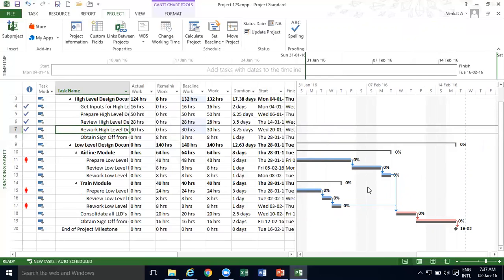Okay. Can you see that now? Yeah. Okay. So basically, what I'm saying is that new activities or some unplanned activities come, or there is a rescheduling required. Then the project deadline will change automatically. It will get delayed. So then we re-baseline the project just to realign. It's not that for each and every change we'll re-baseline; we do it when a significant number of changes happen.